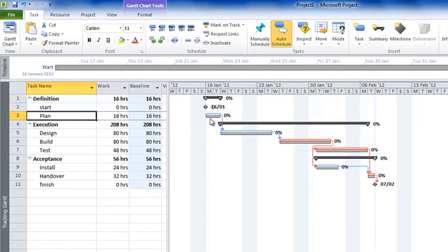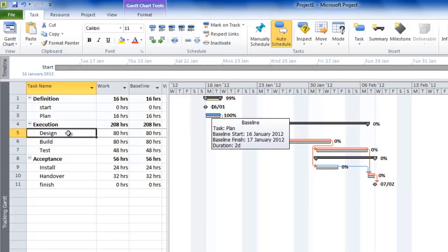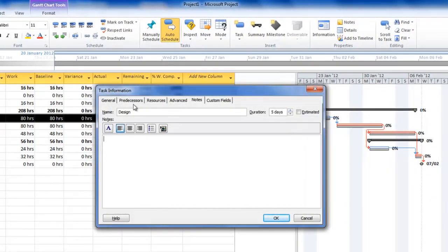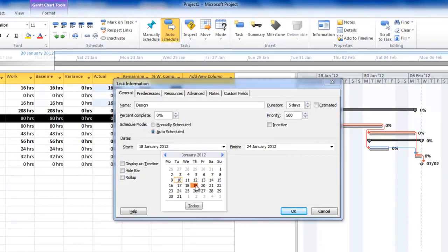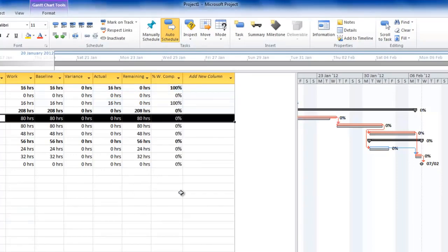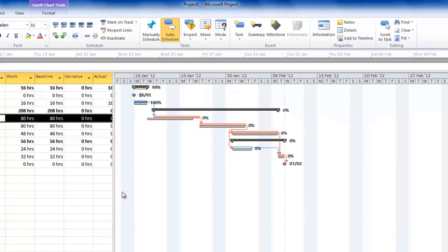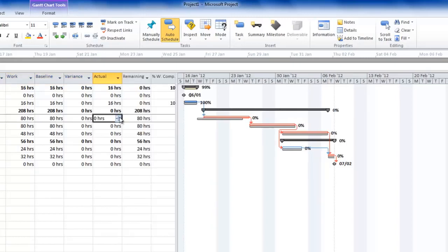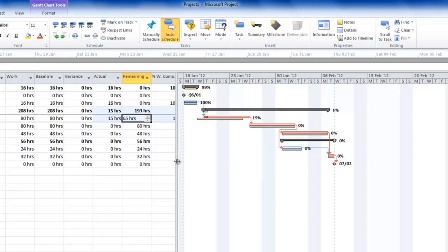Let's go back to the Task tab to enter progress. For the Plan task, use the 100% complete button to mark it as done. For the Design task, double-click the task name, go to the General tab, and set the actual start to the 19th of January. Press OK — Project asks whether you want to move it and keep the link; choose Yes. You can now see it started a day late, and that impact has caused a day's delay to the next task.